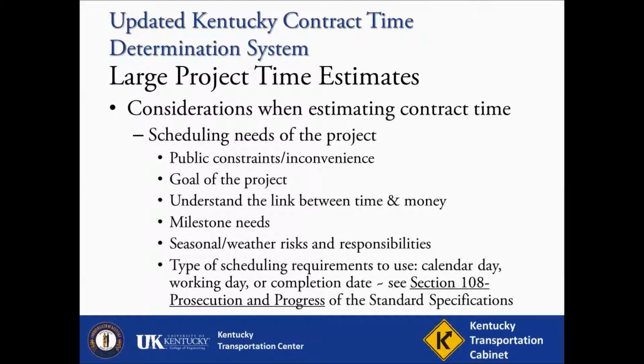Are there access needs that need to be maintained, or maintained by a certain date, for school traffic or other reasons? The answers to these questions may impact the proposed letting for a project or may incur constricting the schedule or use of milestones. There also needs to be a clear understanding of the goal of the project. Is it intended to be in place and open for a particular reason?